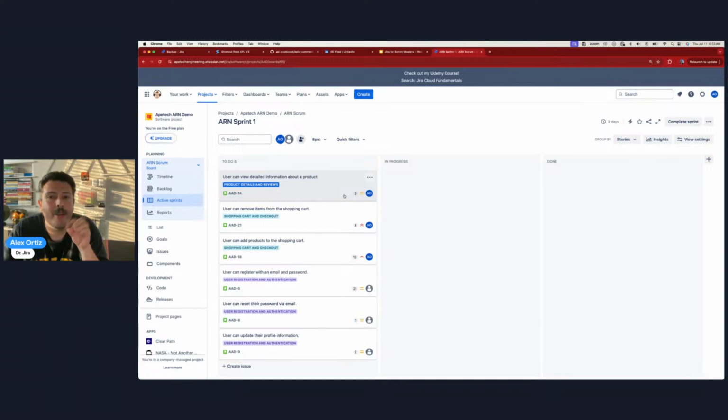And they're going to tell you how long an issue has been in this particular status. This is something you want to be watching for as well, because this will give you a warning of a story being stuck in a status, and your team's either not making progress on it because they're actually stuck, or they just haven't updated their Jira issues. So you want to be looking at this little thing.